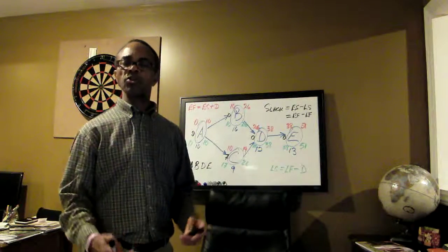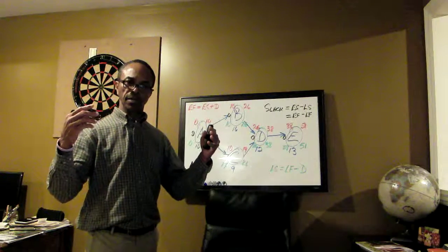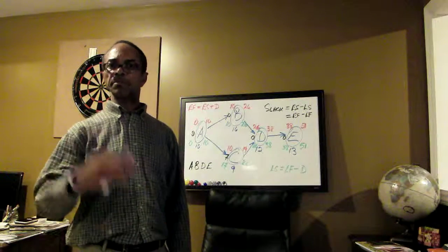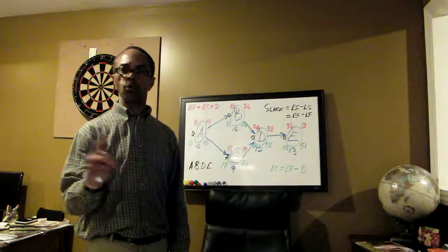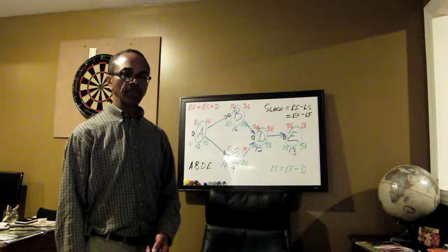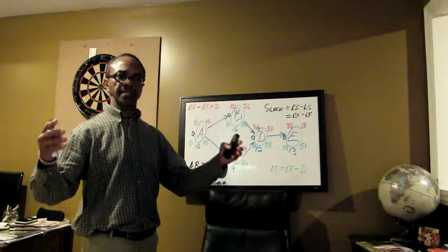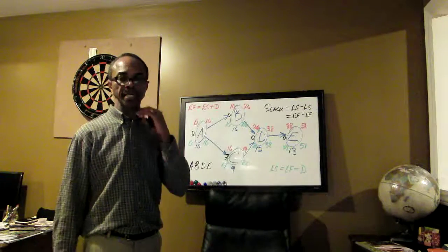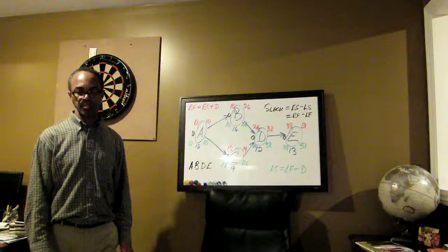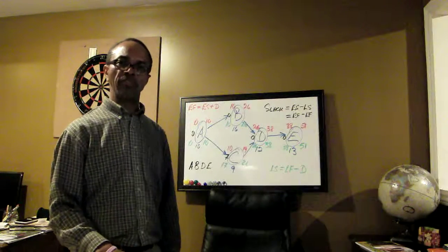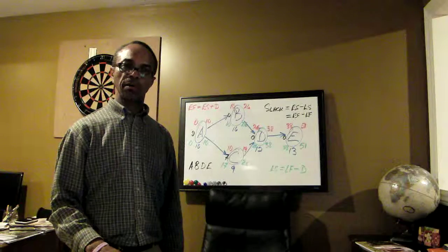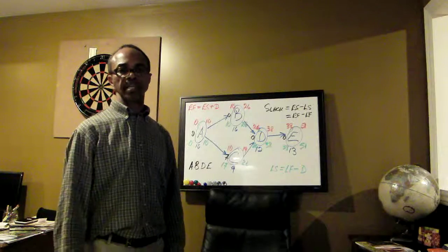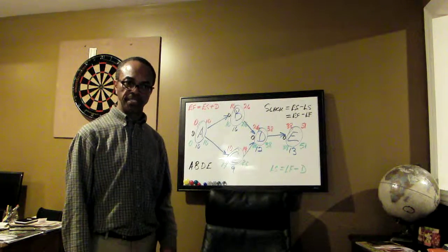So I repeat that. A time constrained project is one where the completion date has been imposed and it has to be achieved. Anything other than that means that you've failed with your project, and that's not what we want to do with our projects. In time constrained projects, time is fixed, and there's usually a tendency for there to be some flexibility in your resources. So it means that you may use more than what is planned in terms of your resources to achieve success with completing a project on time.